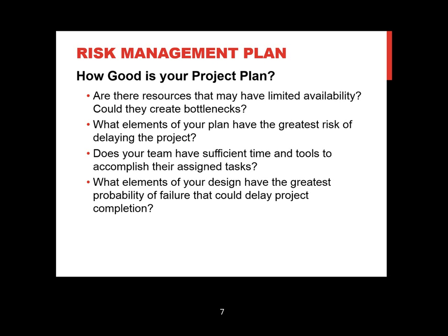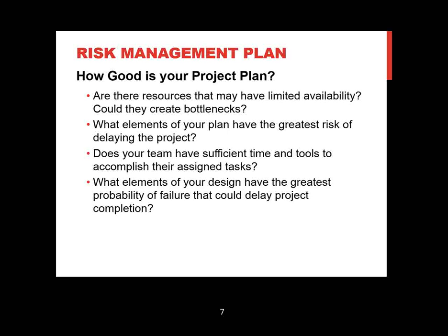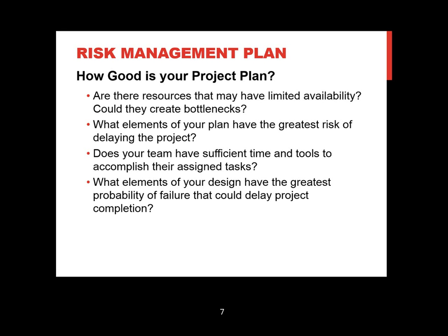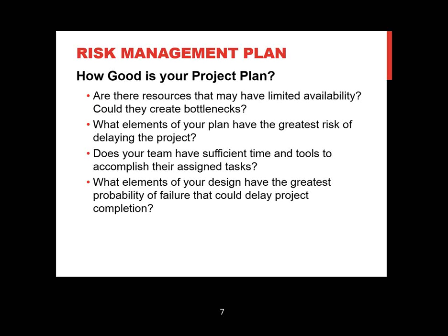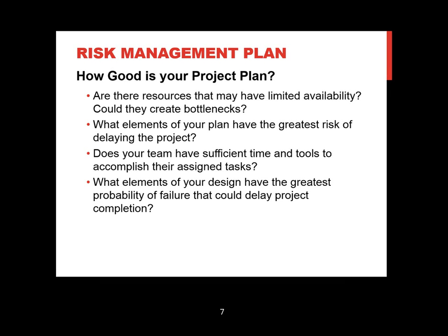You also want to ask yourself, does your team have sufficient time and the tools to accomplish the tasks at hand? If the answer is no, then you have to give very serious consideration to that task that's being planned. Is it still something that's critical to the success of the project, that it has to be done that way? Or can you alter the deliverable of that task or the fashion in which you do that task in order to reduce the time or the resources required to complete it sufficiently for the project to move forward?